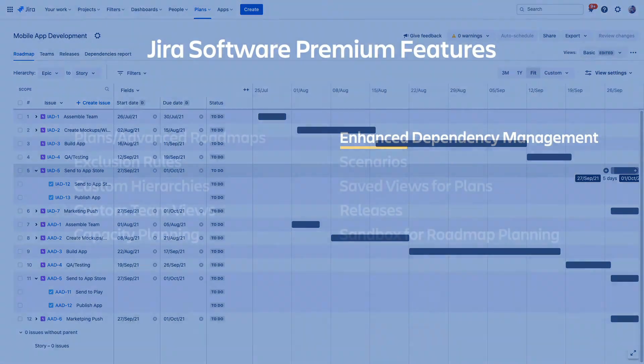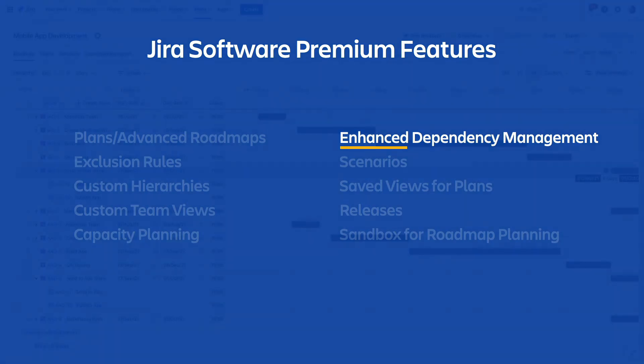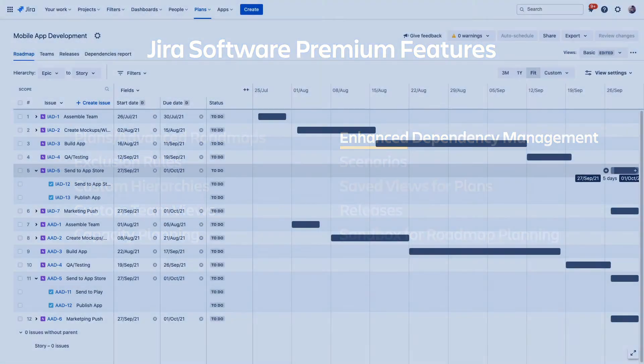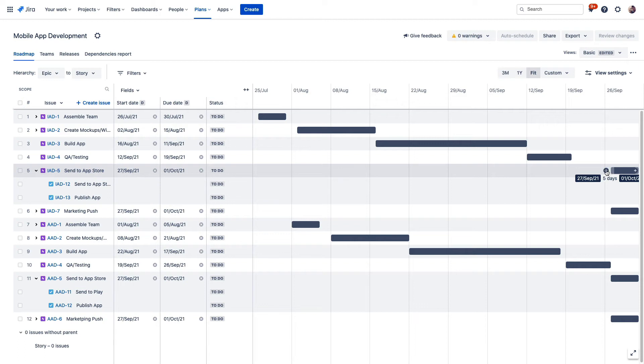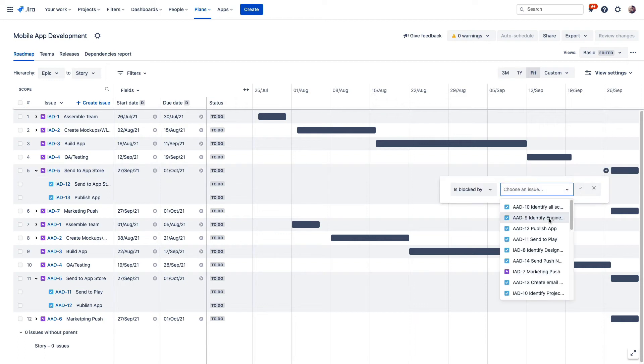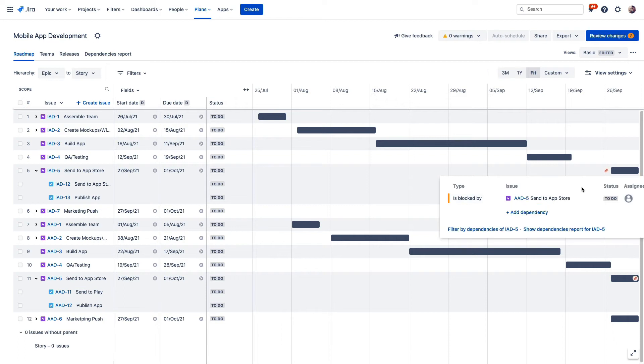Next, let's take a look at creating issue dependencies in Advanced Roadmaps. Just like you can link issues together in your individual projects, you can create dependencies across projects in your plans. We mentioned wanting to release iOS and Android apps together so we can create a link between an issue in our iOS project and an issue in our Android project right here from our plan.